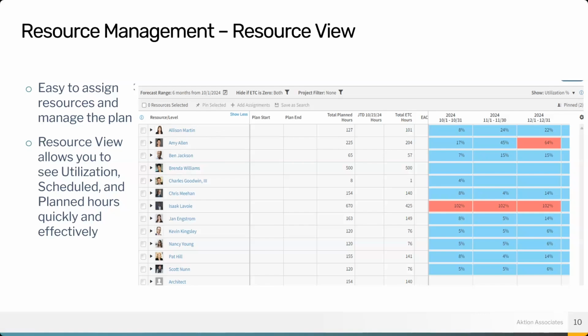So quickly update that information based on looking at this data and make adjustments to individual schedules based on their availability and their expertise. So within the resource tools, you can actually search for people that might have certain availabilities as well as background to be able to find that match and then be able to assign them to new projects.